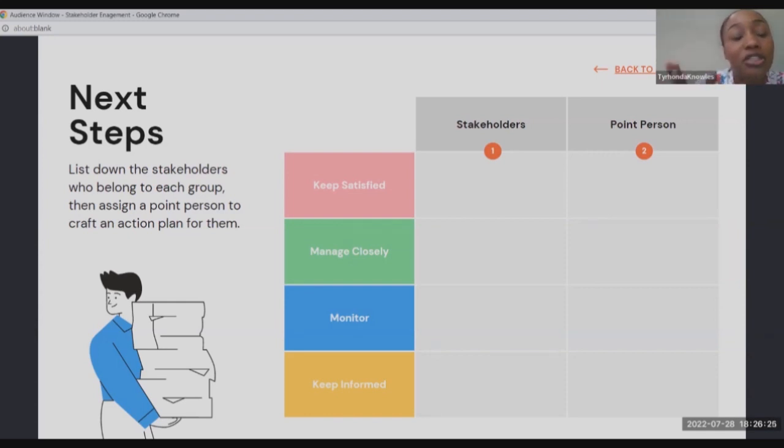I don't know if it varies from industry to industry or organization to organization, but in our agency, the project manager will do the initial mapping and identification of those point persons. However, the change manager would be the one who would keep these people engaged and informed during the process. And then at each release, the project managers re-engage once again. I don't know if anybody has any comments or feedback on how you do it in your industry or your business, but I would like to hear that as well. But that's what we do here.